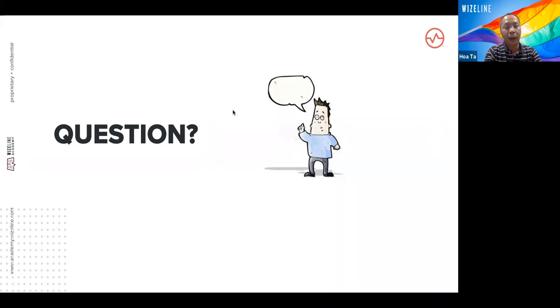Even if we have completed the first sprint with a velocity number, that number is not really steady. Something happened in that sprint, or maybe never happened in that sprint, that impacted the number. So the number still has a high range of inaccuracy. That means we still need to go with the commitment as well. We go with the commitment compared with that number.